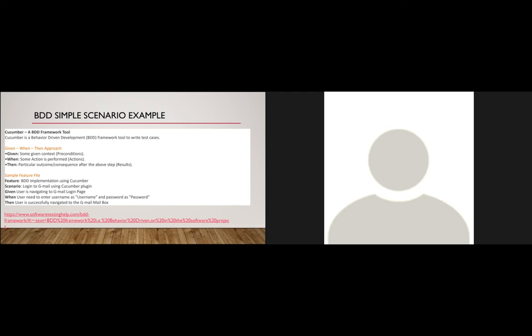I understand where you're going, and you're getting me into the harder part of how this whole thing ties together, right? This is a slide that I haven't seen, but this is the one we talked about. I'll put it together. So you're the product owner, and now you've been working with your customers, and you know what it is that they want. Now I have to sit down with the development team and create user stories that the development team can understand. Right. So I'm going to have a workshop where I can create not only the user story, but also the acceptance criteria.